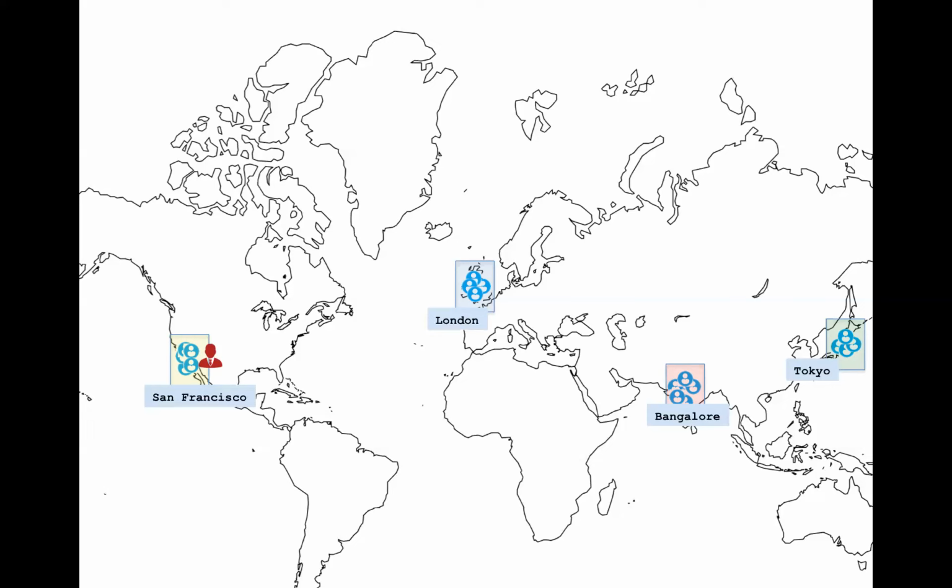And as you know, an Agile team is going to be most effective, most productive if they're small. So for example, if you have, let's say, 10 developers in Bangalore, you want to have 2 or 3 teams there. If you have, let's say, 6 developers in London, you want to have 2 teams there. Each team needs to have a Scrum Master, right? You can see this green circle that's indicating the Scrum Master. You can have 1 Scrum Master, you can have multiple Scrum Masters. Again, I'm using these terms very loosely.